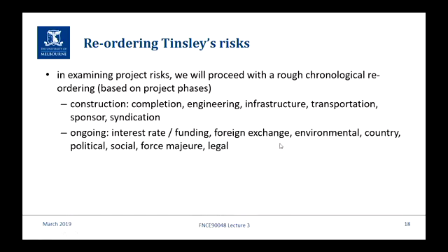Then there's a whole group of risks that I would argue are ongoing. They start in the construction phase and are all still going in operations. That is, of course, interest rate risk, because even if you're in the repayment cycle of the loan, you're still subject to interest rate risk because the loan repayments change every time the interest rate changes.